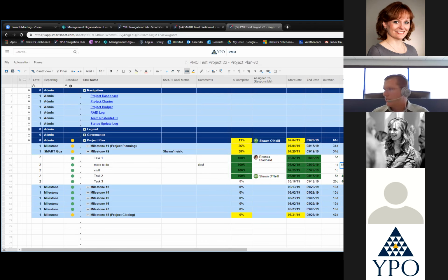When I hit enter, it moves it to take place after that task. And if we actually wanted this guy to take place after that one, then we would type in 46. And this will move to take place after that one. And you'll see it moved.